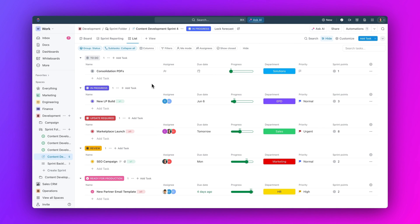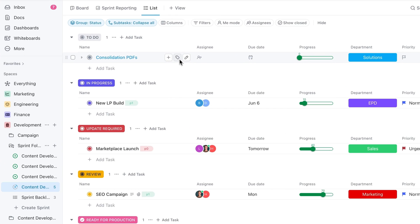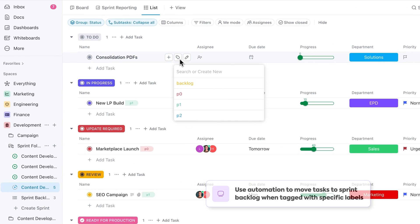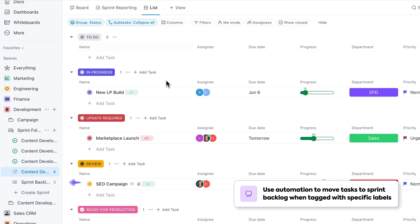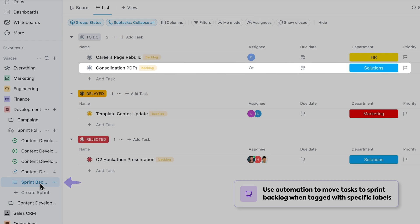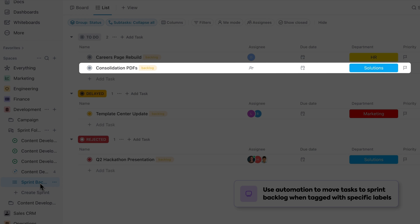And if you're working with sprints, you can create an automation so that when tasks are tagged with a specific label, they will automatically be moved to the sprint backlog.